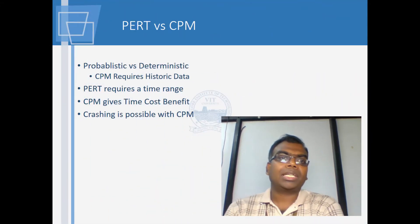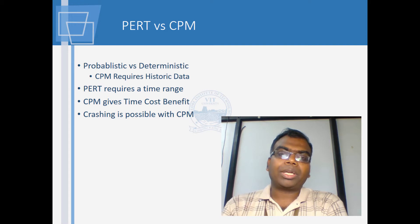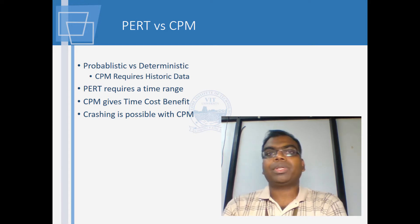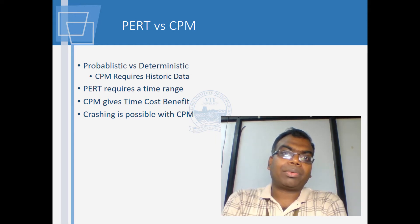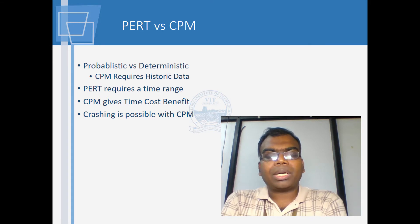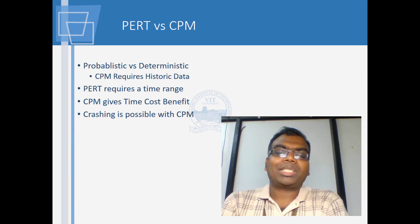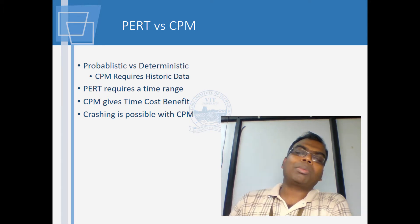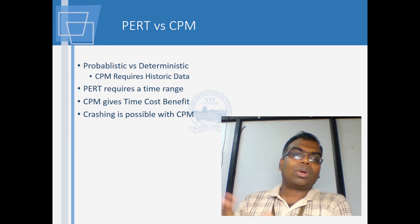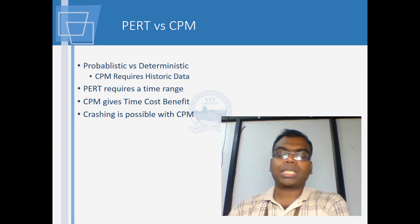PERT is Program Evaluation and Review Technique. The difference between the PERT and CPM approaches is that CPM is highly deterministic. We cannot create a CPM network without having a fair idea of the time required for various activities. However, in PERT you have a cushion in this aspect — we make it probabilistic, factoring in how probable it is that work starts or finishes at a given time.